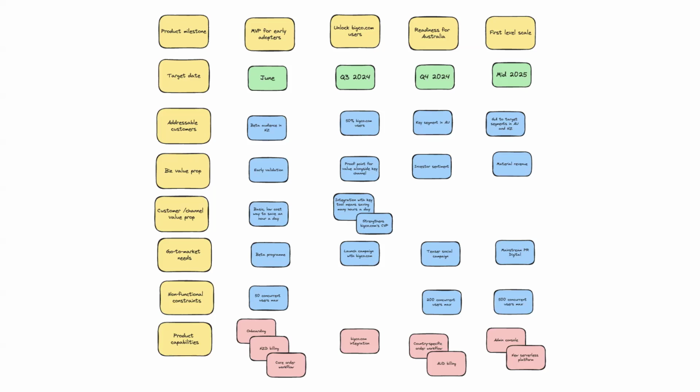Yeah, I mean, that's a bit of a reverse engineering exercise, right? You've got to observe enough of who's doing those things anyway to get a bit of a picture of what might be happening. The thing that I've done a number of times, which I still think is as much of a business cliche as it is, it does work, is your good old RACI or ASCII matrix, right? And it's the straw person again. In the same way that defining the milestones, the easiest way to do it is just bash out the milestones and then make people angry by showing them the milestones and then incorporating their feedback.